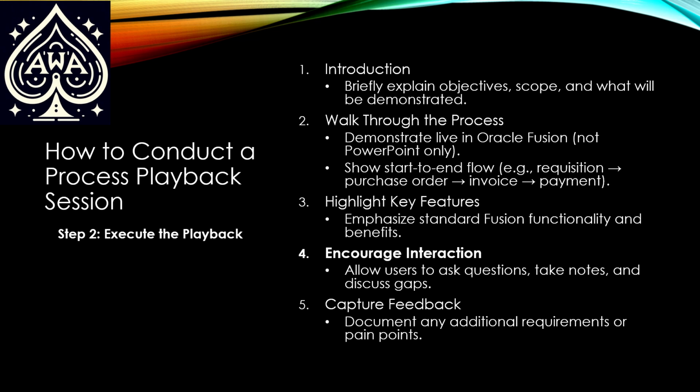Now, to the prepare stage, get slides of everything you're going to show, screenshot by screenshot. You don't want to use them, but we've all had network issues, or I haven't been able to connect to the printer, or to the screen. Stuff's going to happen. Prepare for it. Have the deck ready in case you need to go to it, but you want to show in the system. And we're going to show beginning to end, soup to nuts. This is what we're going to go through.